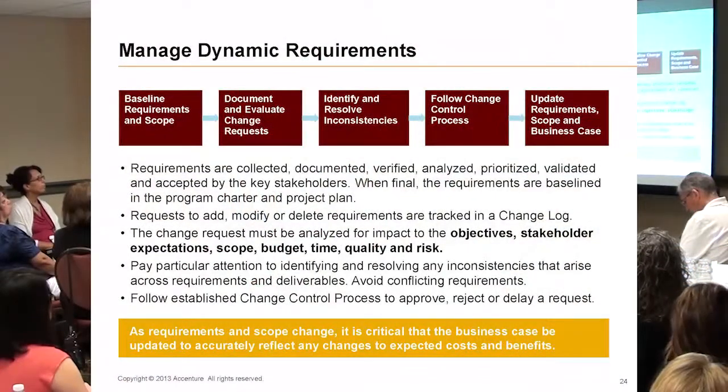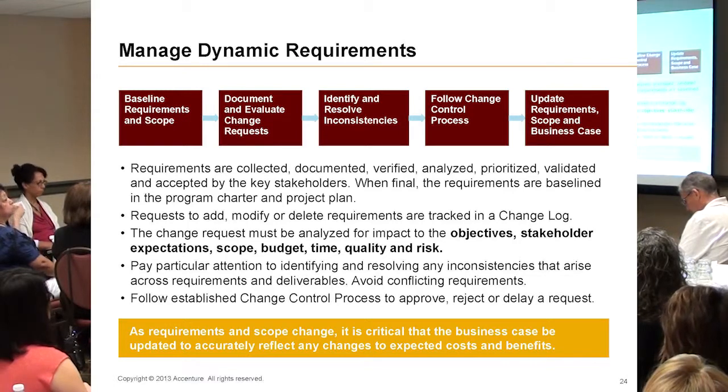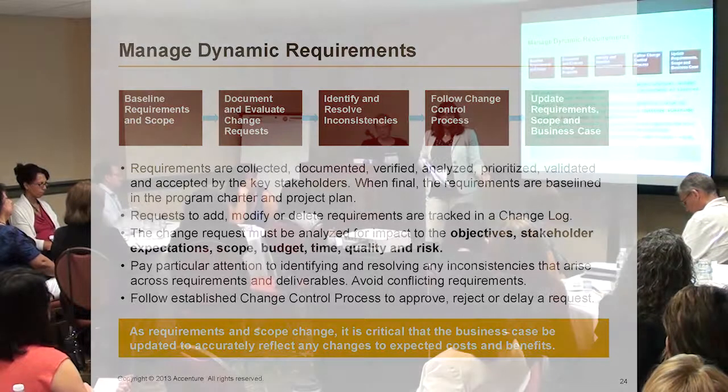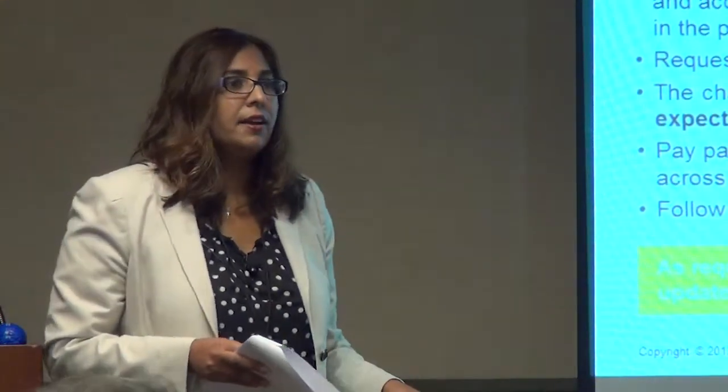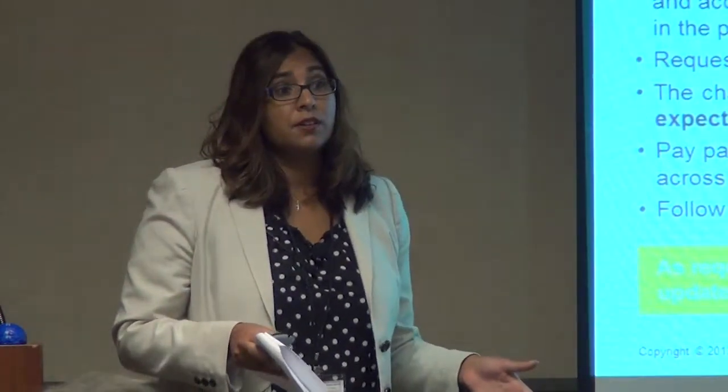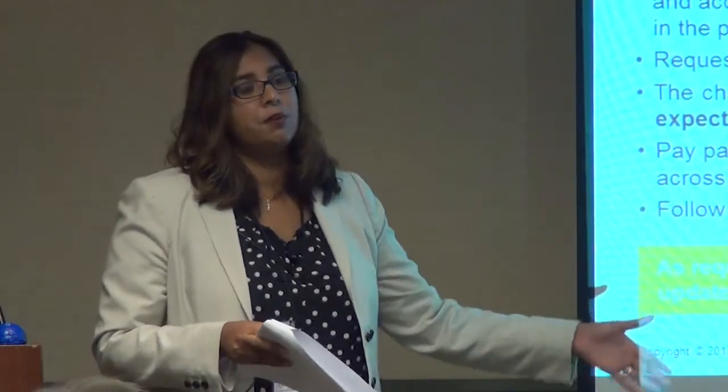And then finally, my yellow box down here: as requirements change and as they are approved, the business case must be updated if it's going to change your expected outcomes, right? Small changes may not move the needle, but if it's a big change, the business case needs to reflect that.